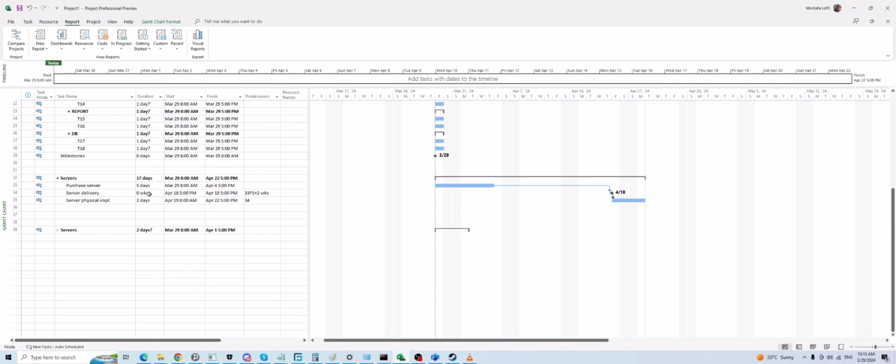Another usage for milestones I can tell about. You can put important deliveries of your project also as a milestone inside of your project plan. So later you can create a report based on the project deliverables and show it, for example, to high-level management.